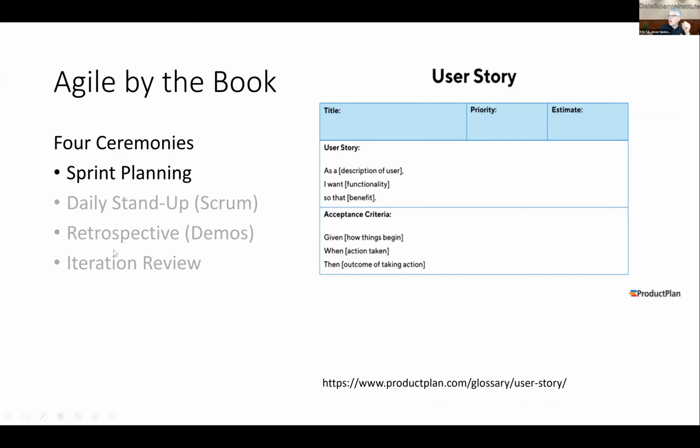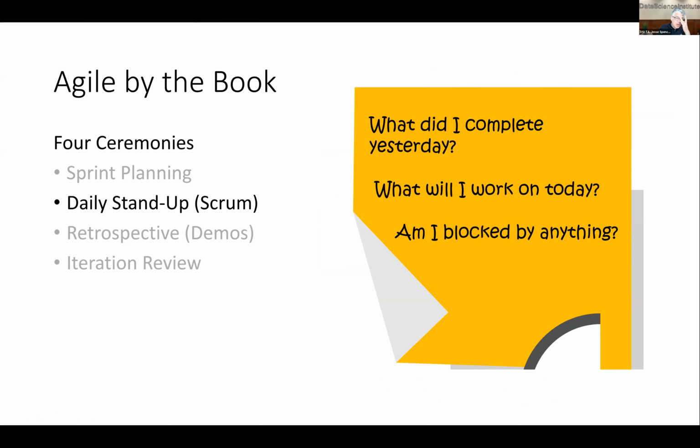And then in traditional Agile, you have a daily stand-up, and they're very serious about it. They mean stand up, like, no, stand up. Because if you're sitting down, you can talk forever. So this is kind of that nice approach of how long do I talk about my favorite thing? Well, you're standing and it's kind of uncomfortable. So eventually you have to sit down. So you're only supposed to answer the question, what did I complete yesterday? What will I work on today? Have I blocked anything?